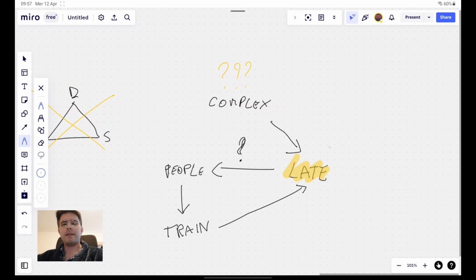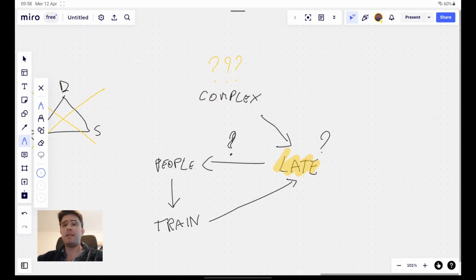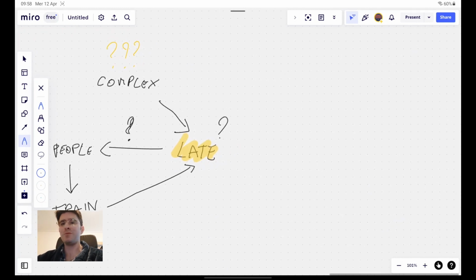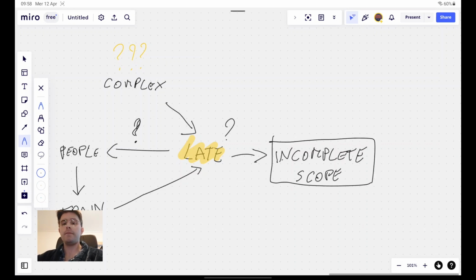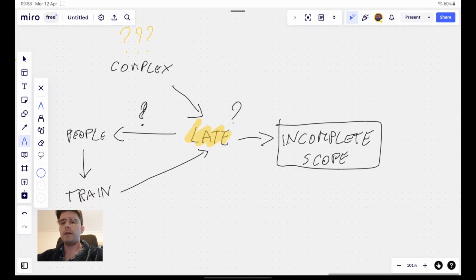This happens a lot. I have personally seen this cycle repeated multiple times in a project until at some point the manager, whoever is responsible for it, decides to cut the losses and deliver whatever is ready, or not deliver at all. Software projects, counterintuitively, are often delayed by adding more people, especially if close to the deadline. This is also known as the Brooks Law, as it was coined by Fred Brooks in his 1975 book, The Mythical Man-Month.